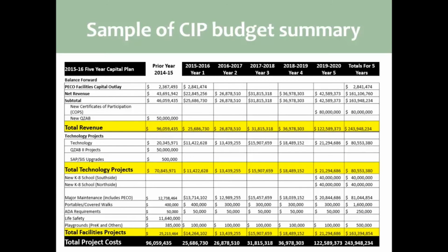The individual projects are summarized in the CIP. This total budget will show revenue as well as projected expenditures required to meet the scope and schedule of planned new construction, school-specific facility improvements, and equipment purchases that the district intends to make. The decision to approve a capital improvement plan is always tied to the school district's multi-year capital budget.